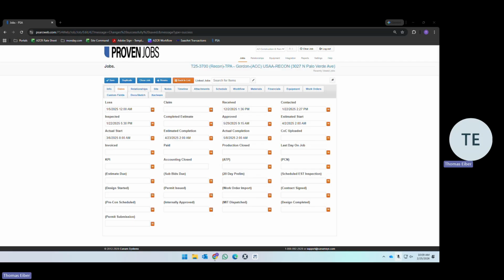True warranty work is different. If something happened a while after the job is completed, something's discovered, a workmanship issue, a subcontractor, or one of our field guys hid an issue, that is not recorded against you. It's avoidable issues with PCNs and additional visits.